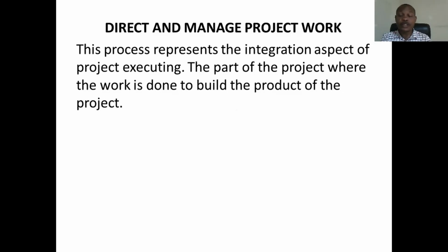Please, before I go, I want to say that your project management plan will have to be approved before you can use it. The key stakeholders and the project owner will have to approve it, and that approval has to be in agreement with all the key stakeholders, to avoid anybody coming up tomorrow to say, no, this is not acceptable.